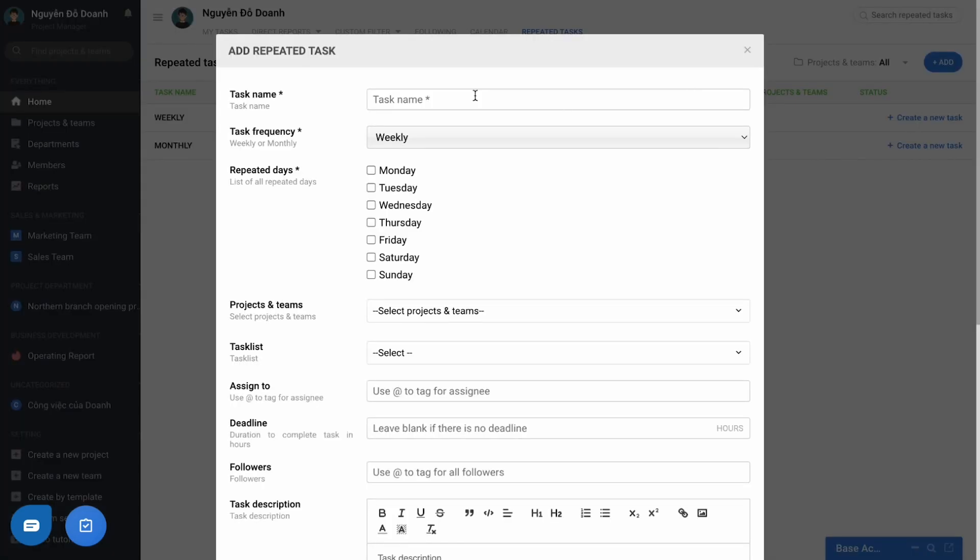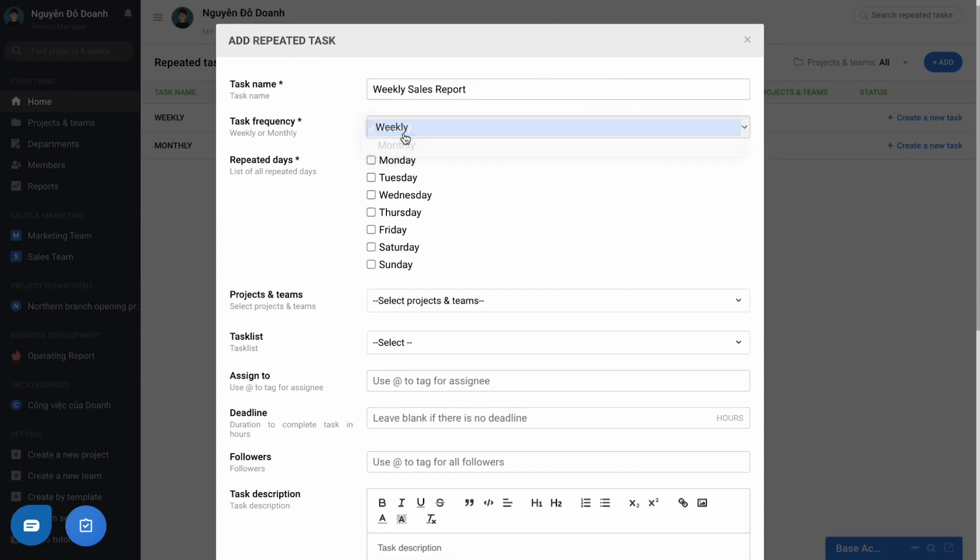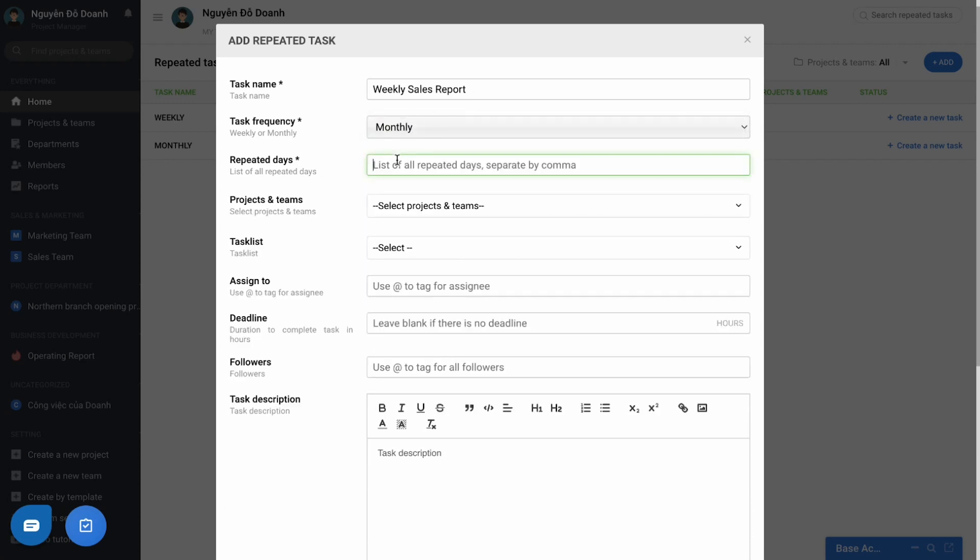In the information form, enter the required information like task name or task frequency, with weekly or monthly repetition. With every week, you can choose one or more days of the week, and with every month, you can fill in the days of the month, and the days are separated by the comma.